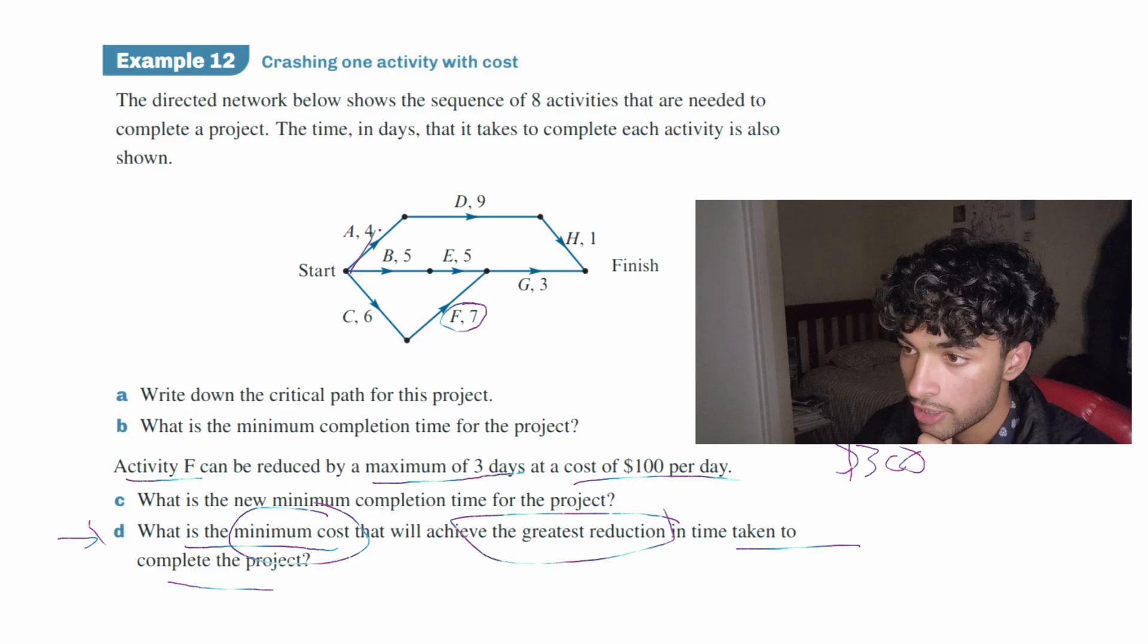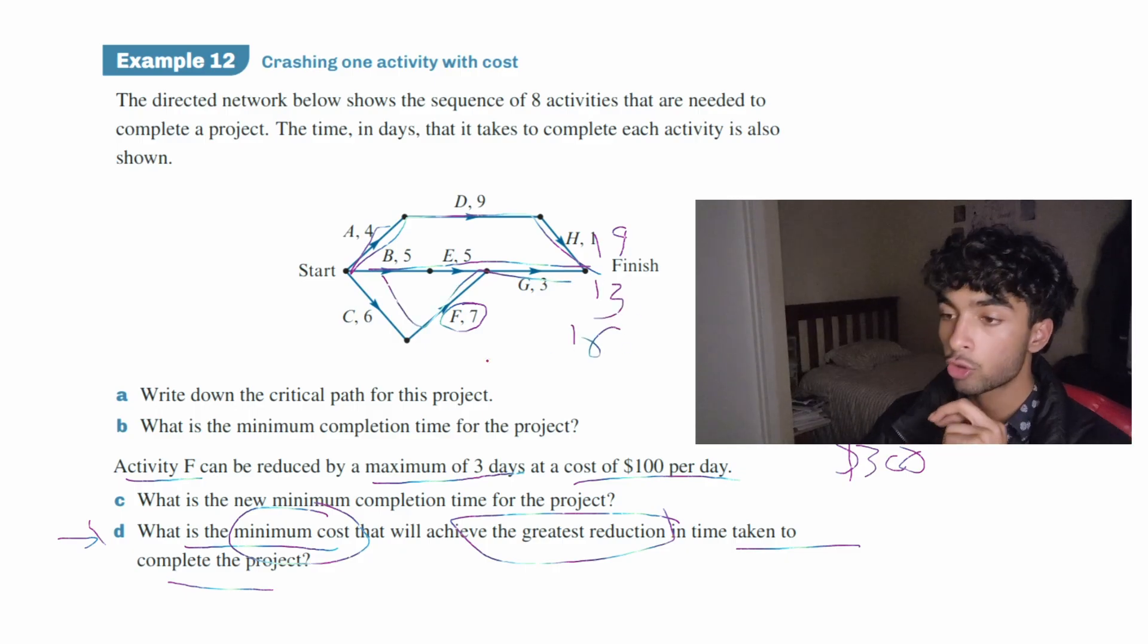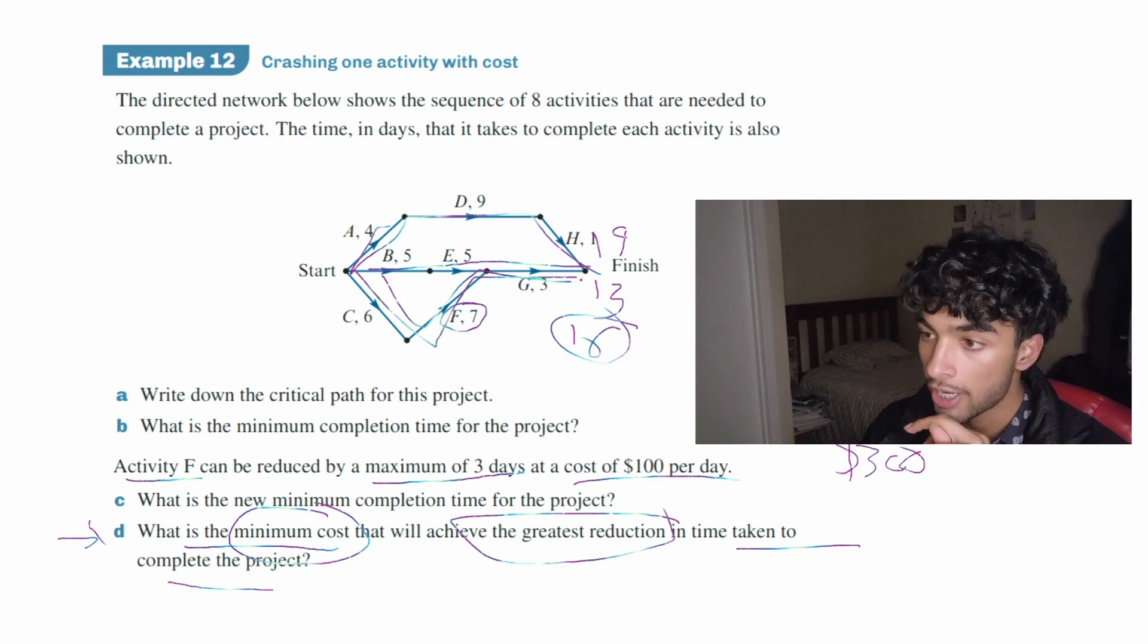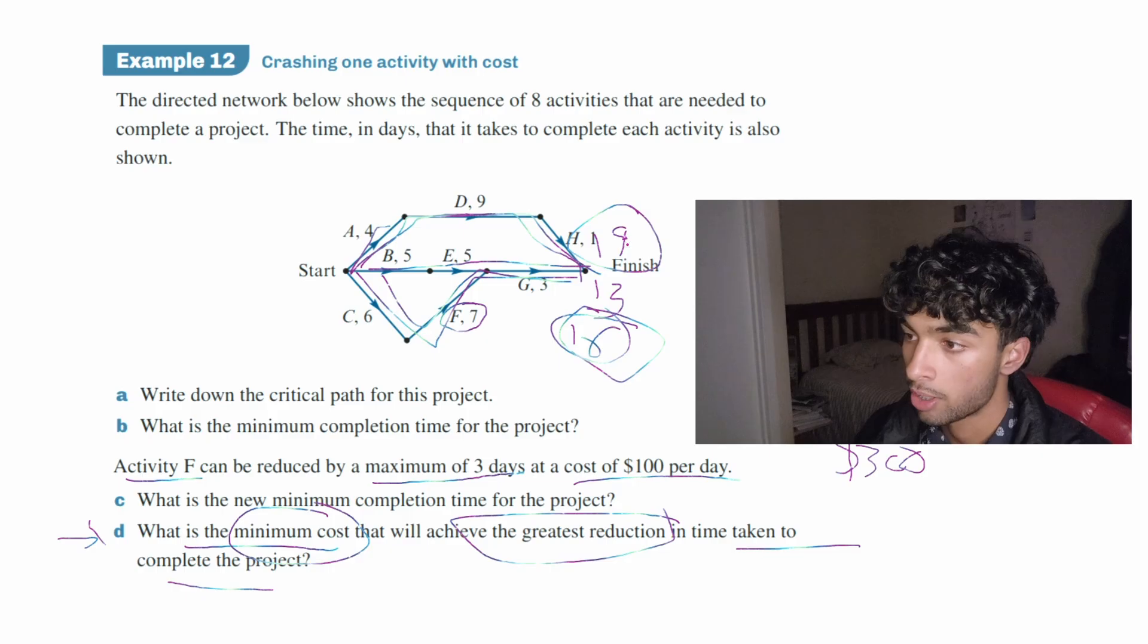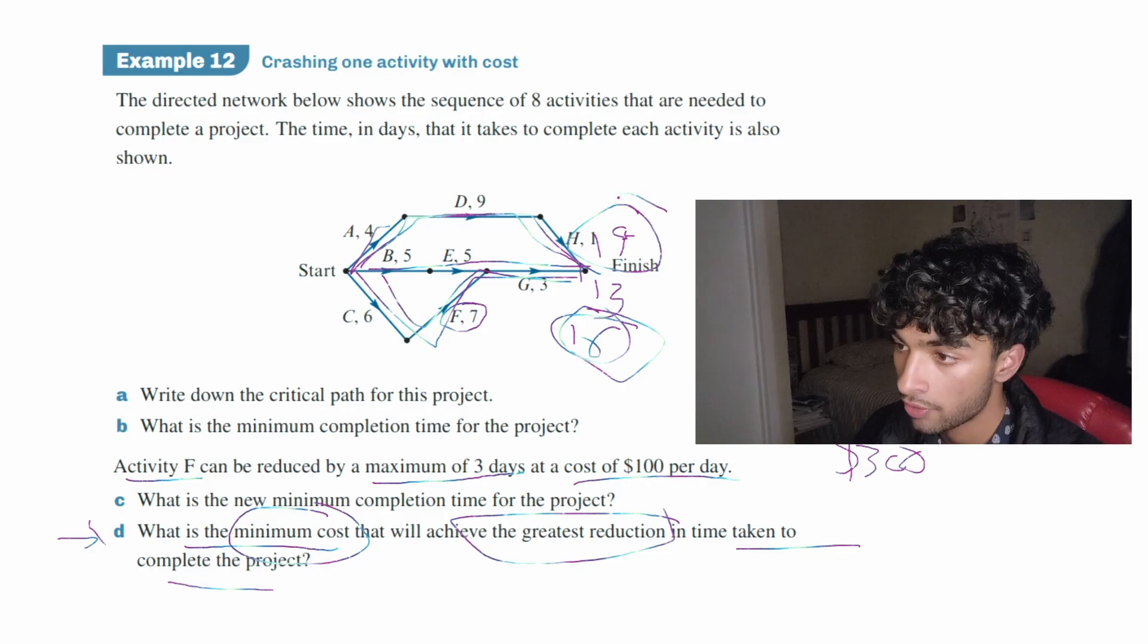So what I'll do here is find the critical paths for each path. So 4 plus 9 plus 1 is 14, 5 plus 5 plus 3 is 13, 6 plus 7 plus 3 is 16. So the critical path is 16 and as we can see, F lies on that critical path. So what is the second longest critical path? And that is 14 and as we can see, activity F is not on this second longest path, which means that if we reduce F three times, it's not going to be effective because the next longest path is 14.